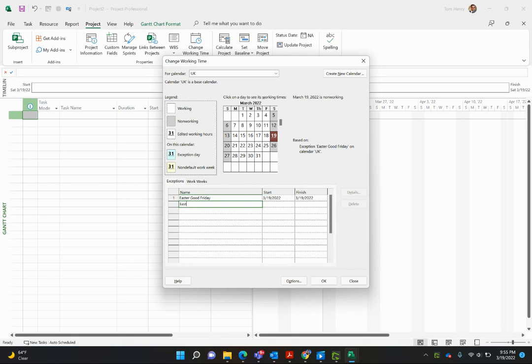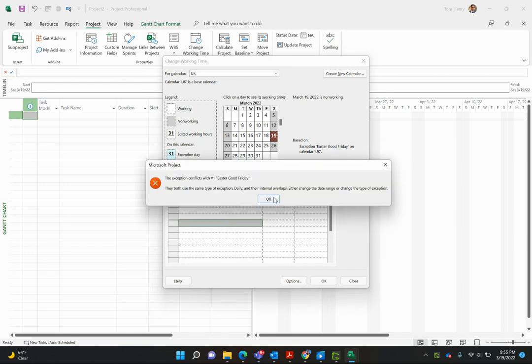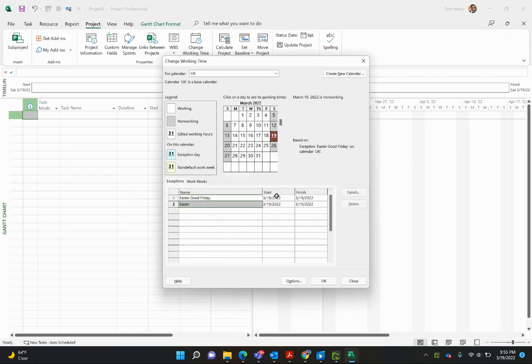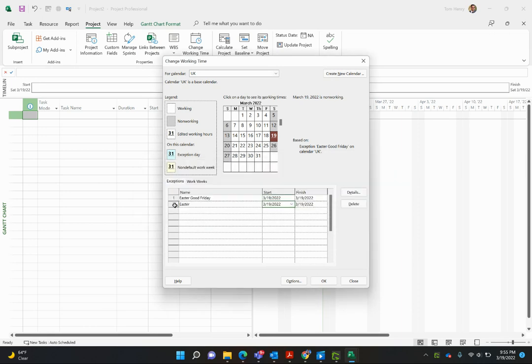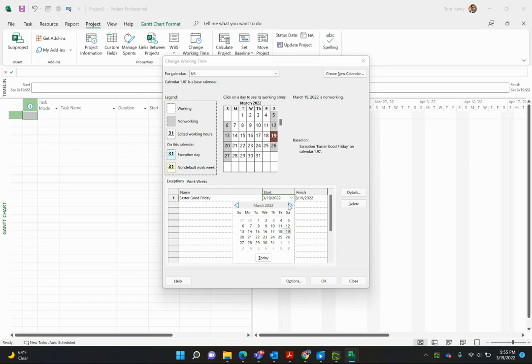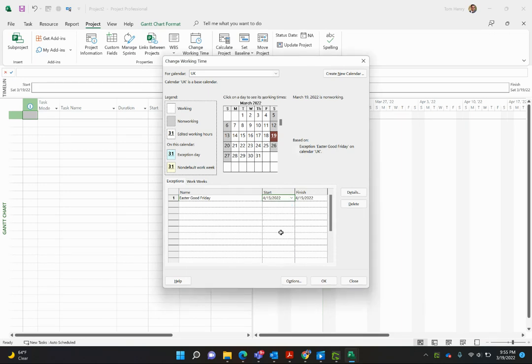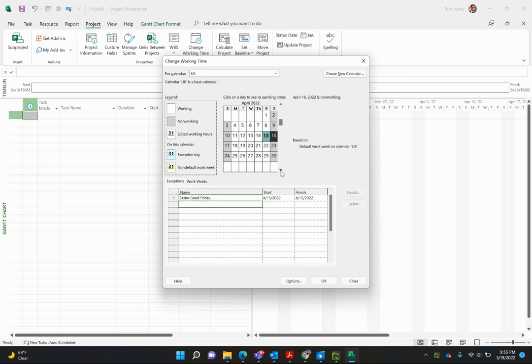So I'm going to come in here. He doesn't like the dates. Let me cancel that one. I'm going to do Good Friday, which I think is coming up January, February, March, April. I think it's going to be the 15th. It's Good Friday. So it starts and finishes on the same day. When I look at April on the calendar now, it is not a working day. So we can set up the calendar exceptions. That's more of a calendar thing.